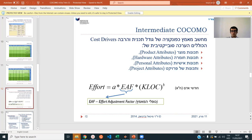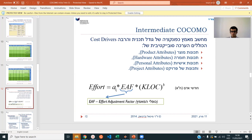Now we're going to make COCOMO a little bit more precise. The calculation of effort we did before was A × (KLOC)^B, but we're going to modify it with the EAF — effort adjustment factor. This relates to what people we have: if we have very gifted programmers or very good hardware, maybe we'll get it done faster, or conversely slower if we have bad people. If the adjustment factor is one, it does nothing. Less than one means it takes less time; more than one raises it.